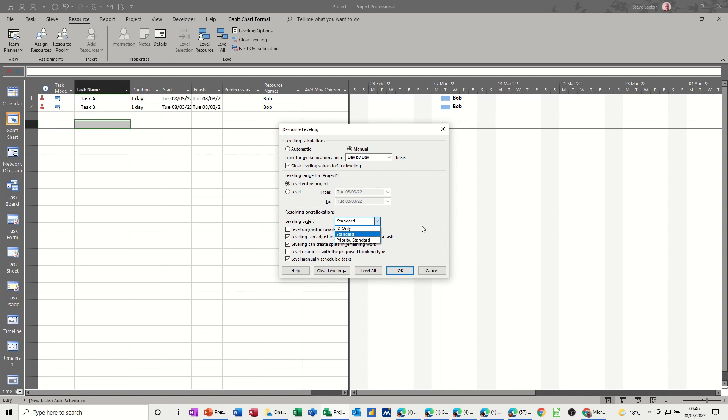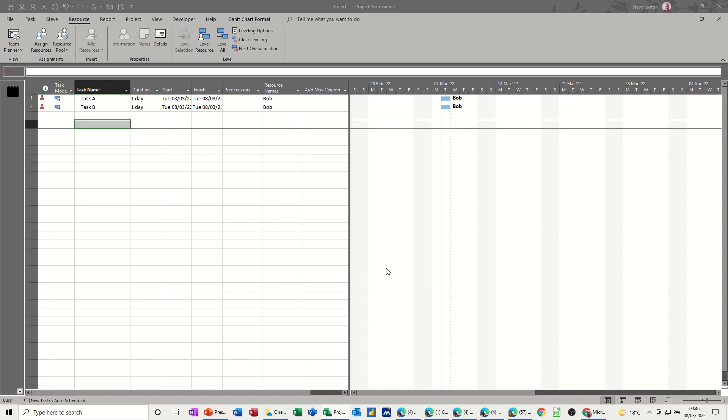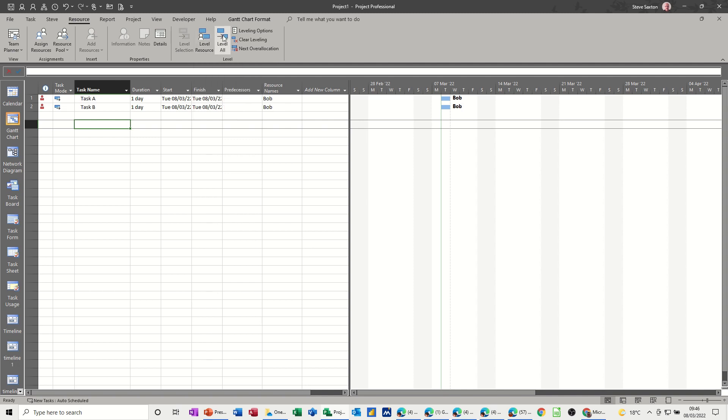So I'll leave this on standard, and you can see what's going to happen. So click OK to that, and then I'm just going to level resource, in fact I'll level all because there's only one resource, and it moves the second task.